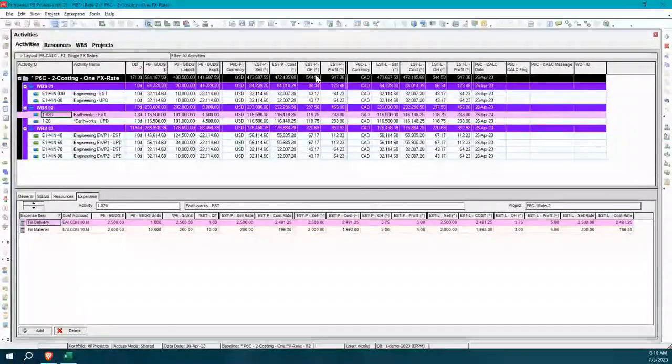That's a tool that we built into the P6-Calculator to automatically do all these calculations, because P6 out of the box will not take a field on the resources and on the expenses, total those up, and then total them on the activity, total them on the WBS, total them on the project. It does not do that automatically with the UDFs. So this is something we've created as automatic roll up, roll down capability.